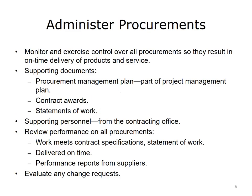You will also need to monitor procurements, which includes the various equipment, software, and hardware products required to complete your project. Your overall project management plan should include a procurement plan. These processes will affect your schedule in different ways — for instance, if it takes six weeks to receive a piece of hardware from a specific vendor, be sure to factor that into your plan. Update any changes and communicate them. Take advantage of the contracting office's expertise with contract language and statements of work. Evaluate proposed changes to contracts for their potential impact, and establish periodic reporting by suppliers to keep you informed of their performance, costs, and any issues that arise.